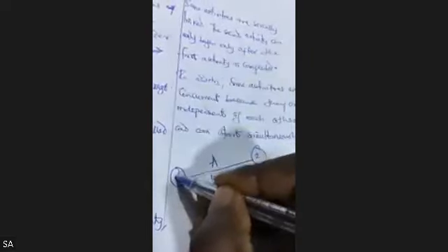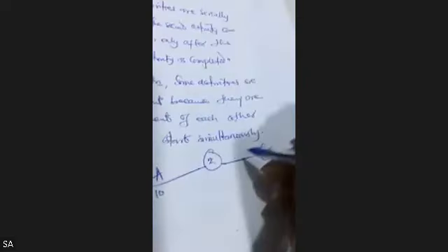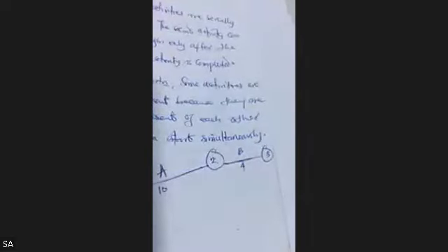Okay, so remember, this is node A. This is the starting node. This is the ending node. This is the starting point. This is the finishing point. So when they now give you activity B after A has been completed, let's say this is now B. This will now serve as the starting node for B, and this will become the ending node for B. So this can actually be B, and then let's say this is 4 months.